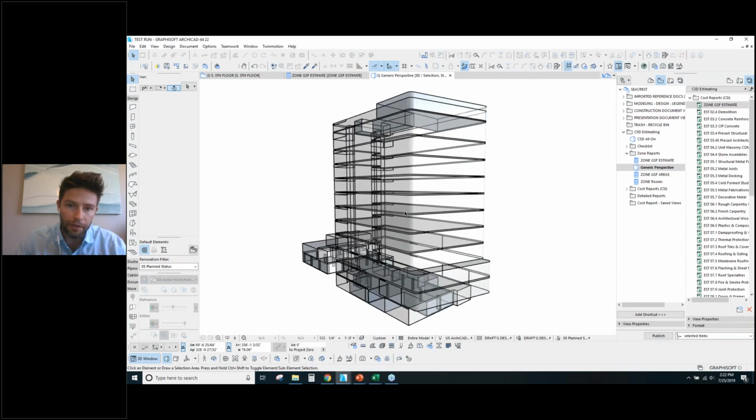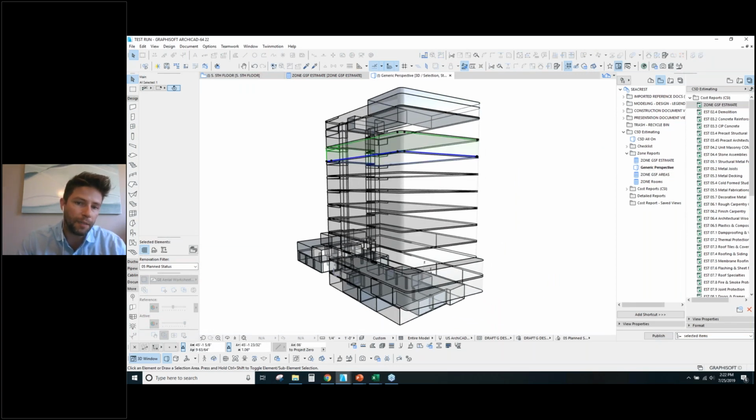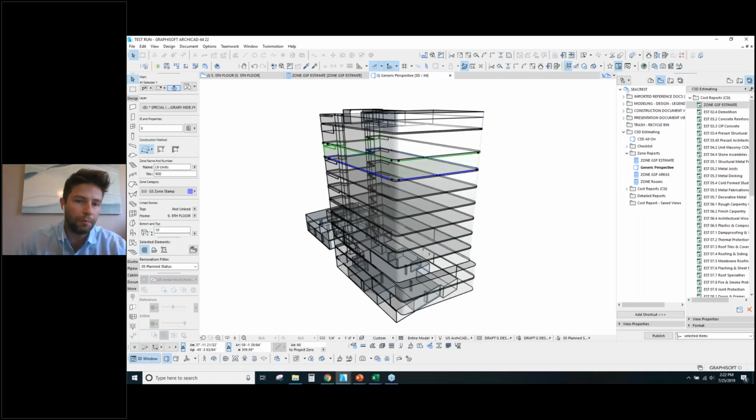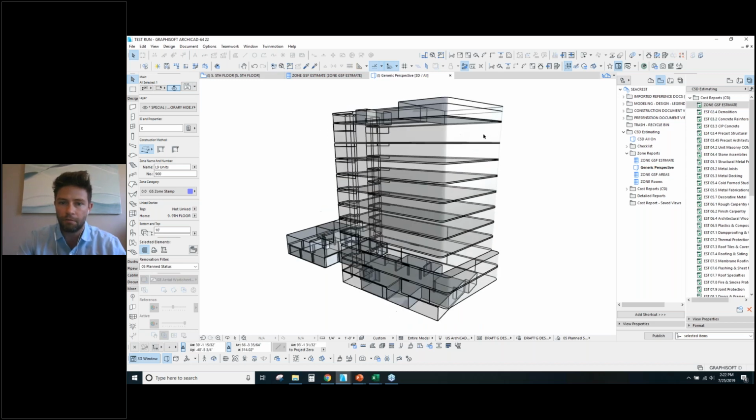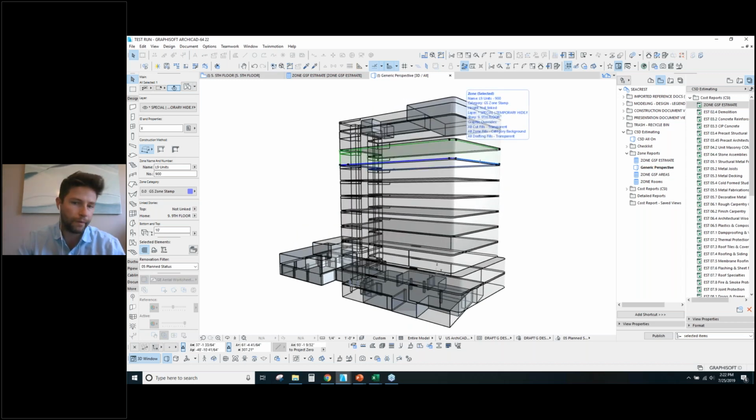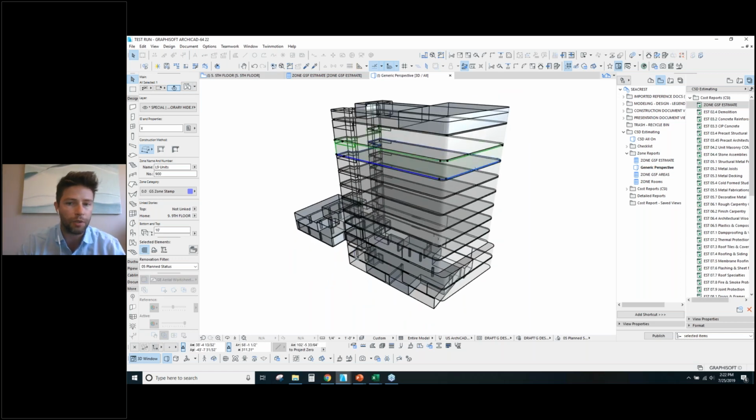So what's really nice about this is we can load up these zones and kind of keep a library of these zones. They don't need to be the full scope of the project, but we can just do, say, a little 10 by 10 zone that captures the full scope for this type of project and have multiple versions of this, and we can start comparing and looking at different cost scenarios to do some early budget planning using these zones, very simple geometry, a lot of data associated with them, and very useful because it aligns perfectly with how we've set up our estimate template here.